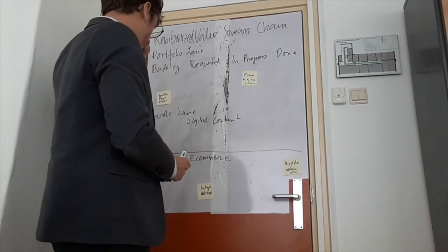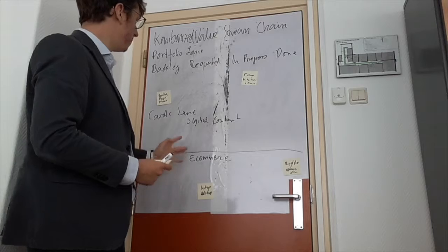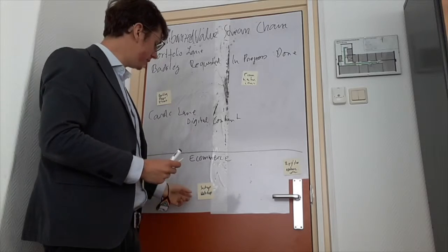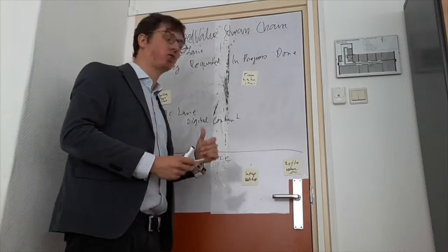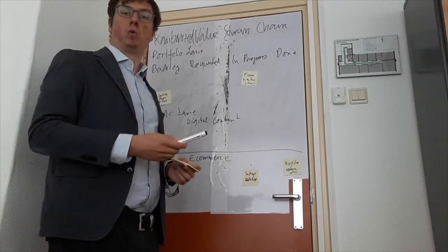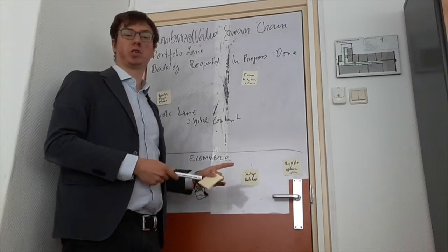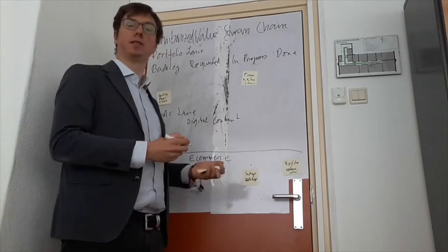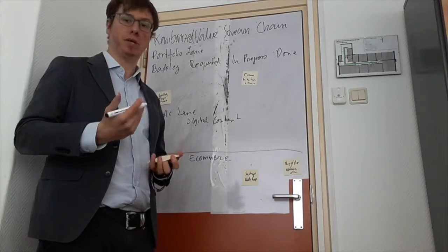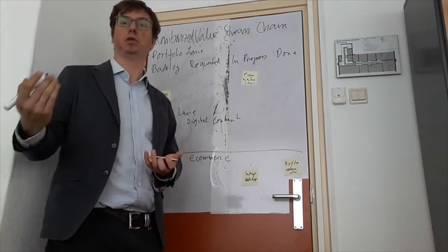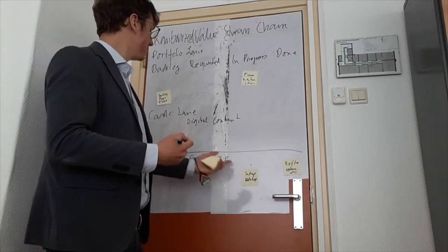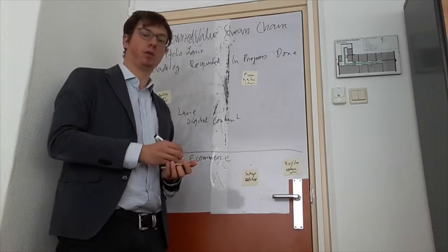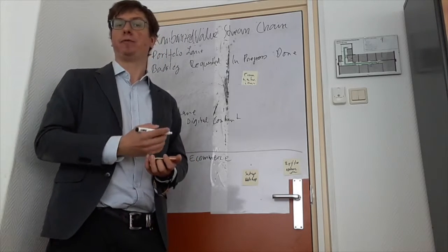And because we are a team now, we see that maybe I should work on finishing up this product before I start a new product. And so we work on setting up the web shop, and what is necessary? The designer is creating the theme and setting up the web shop. He still needs to know the list of the products that are being introduced into the shop. So he will create a new card as well for the boss of the company, in order to send him an Excel spreadsheet with all the products.